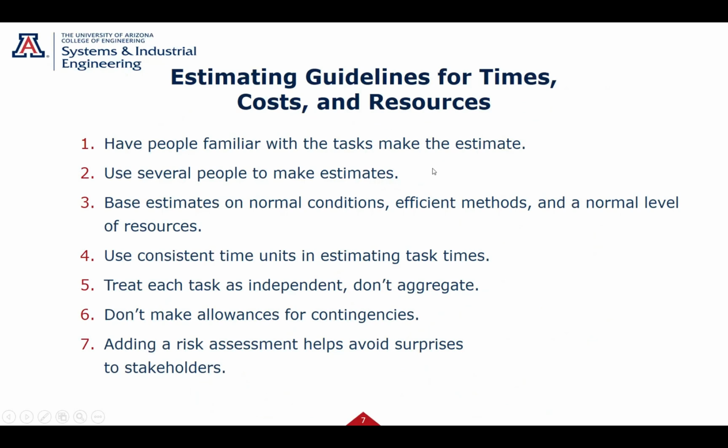That's hopefully going to be true for you, that you're going to have experts in electronics, mechanical, whatever, making those estimates. If you can, and this one's harder to do, can you get several people to make an estimate? If 2 people are making an estimate and they're close, you're going to feel comfortable. If they're far apart, you're going to have to maybe do a little bit more research. But that takes time to get multiple people involved.